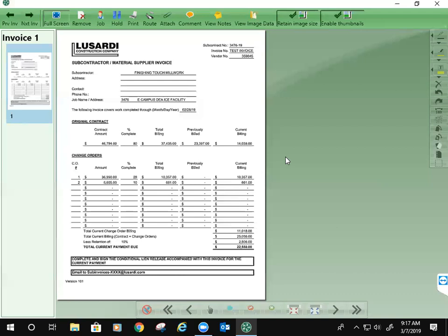On a material invoice, the super gets the email, we didn't get copied on it. They'll get the email, you won't even see that. Yes. They would approve it, and it would go to the next approver. So let's say that's Guyer in this case. Guyer will get an email that says, hey, the superintendent approved it, you have one invoice to approve. He approves it, it goes to you. Then when you approve it, it'll come back to accounting for final review and then payment.